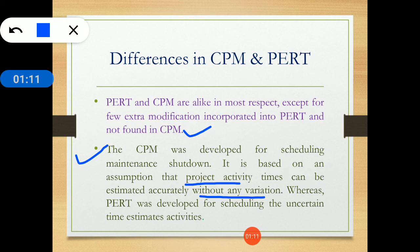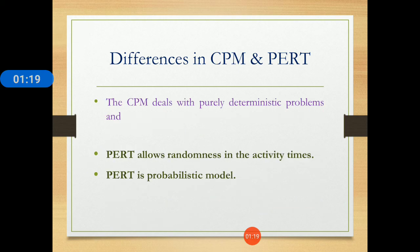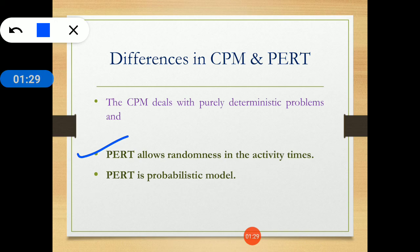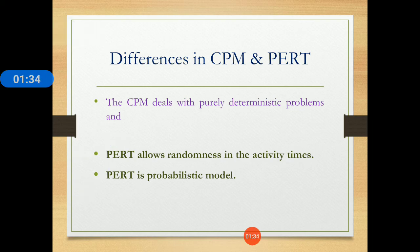PERT was developed for scheduling uncertain time estimate activities. PERT allows randomness in activity times, which is why it is called a probabilistic model — there is always randomness in the activity times and no fixed activity time, which is why we consider PERT a probabilistic model.